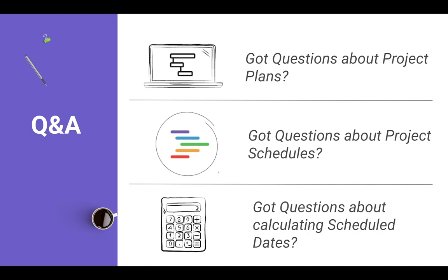So say you created a project and it was adaptive and you needed to change it to be fixed, then Accelo will retroactively make the changes necessary to that project and to the dates of that project to ensure that that project schedule now operates on a fixed basis. The same goes in the opposite direction.